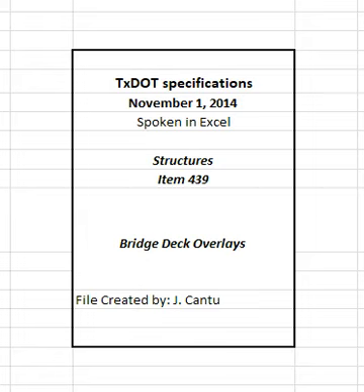Table 3. Polymer and aggregate application rates. See table in specifications. Protect all bridge deck expansion joints from intrusion of polymer overlay materials. Remove overlay over all expansion joints within 12 hours of application and before opening the overlay surface to traffic. Removal may be accomplished by scoring the overlay before gelling, by saw cutting after curing, or by other method approved by the overlay system manufacturer.